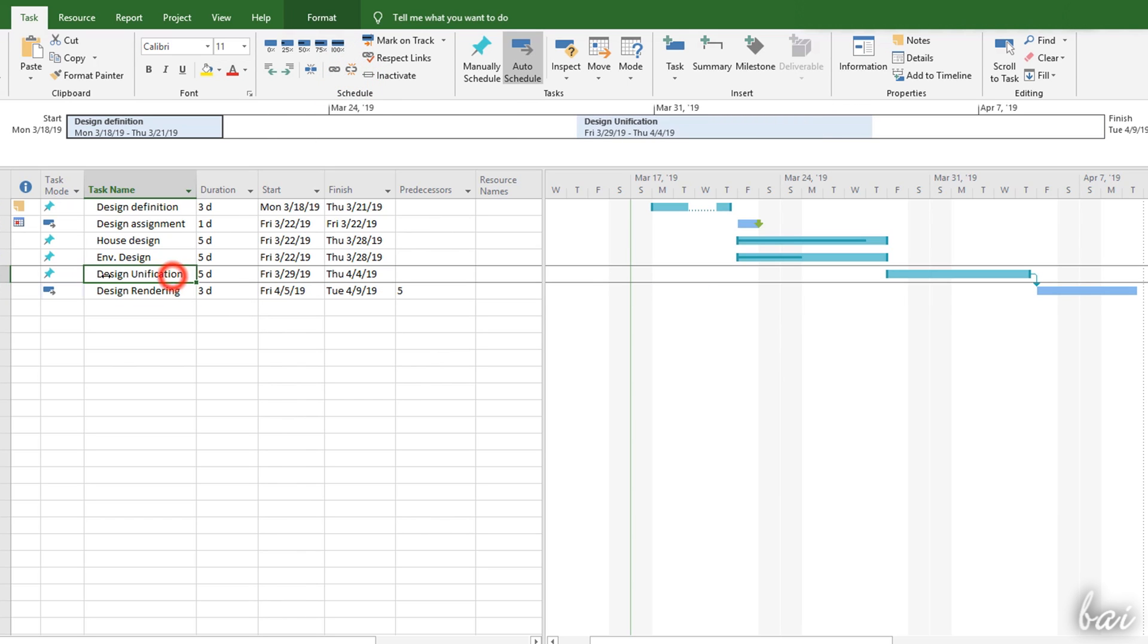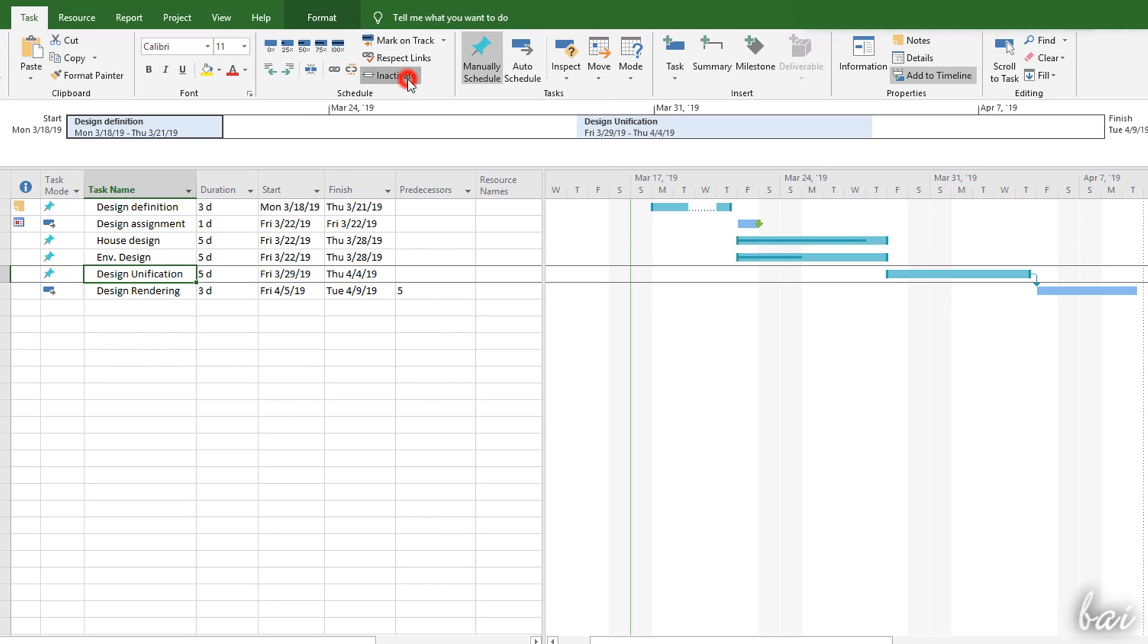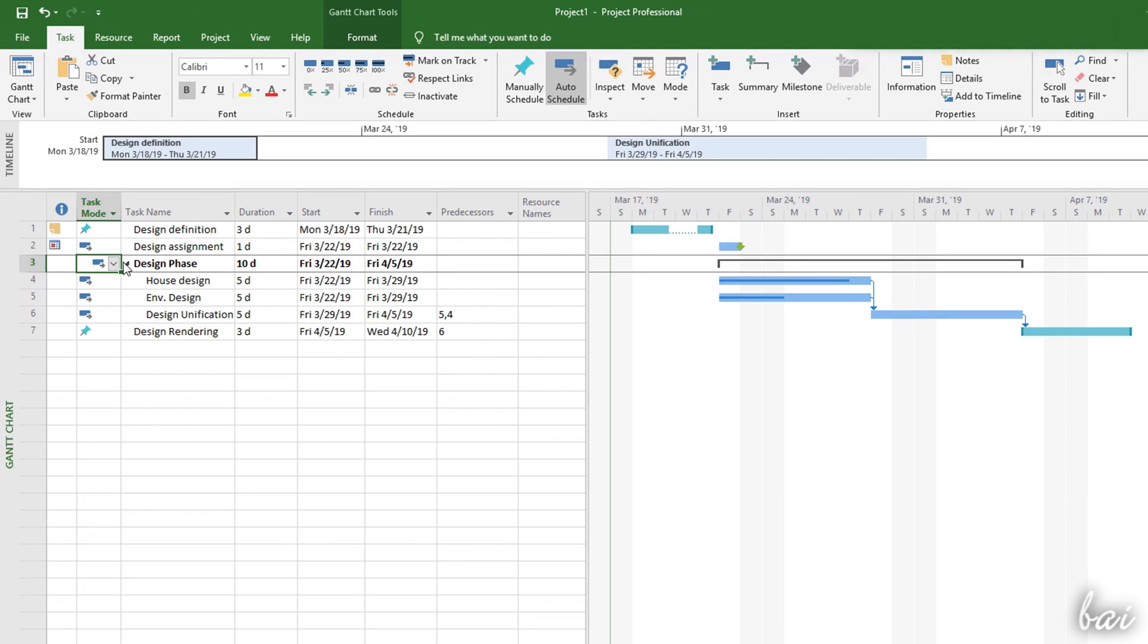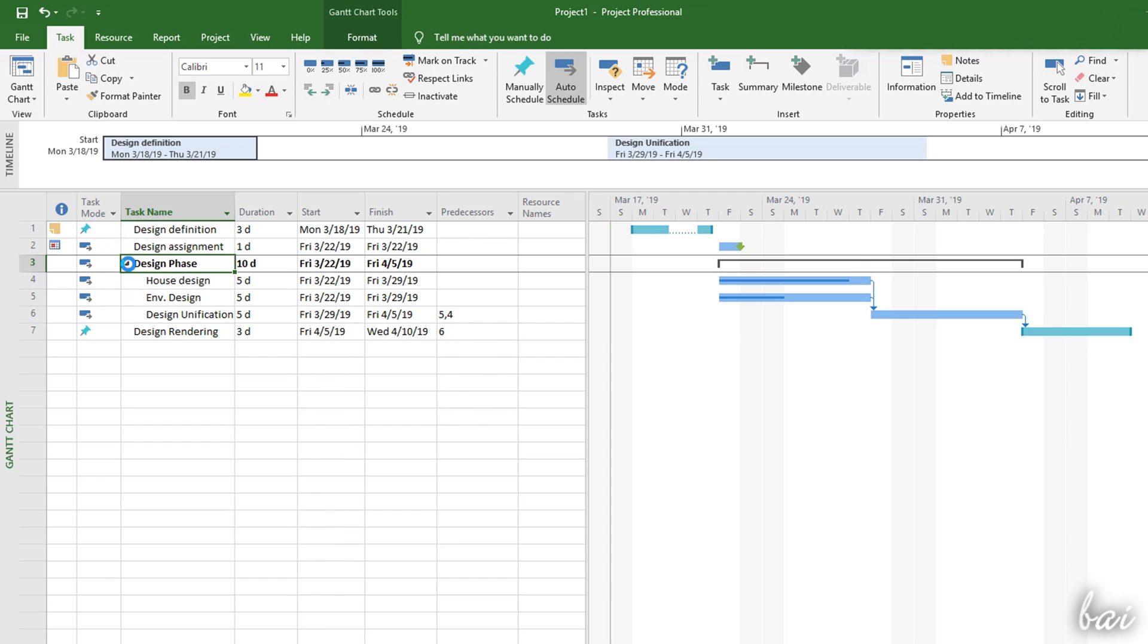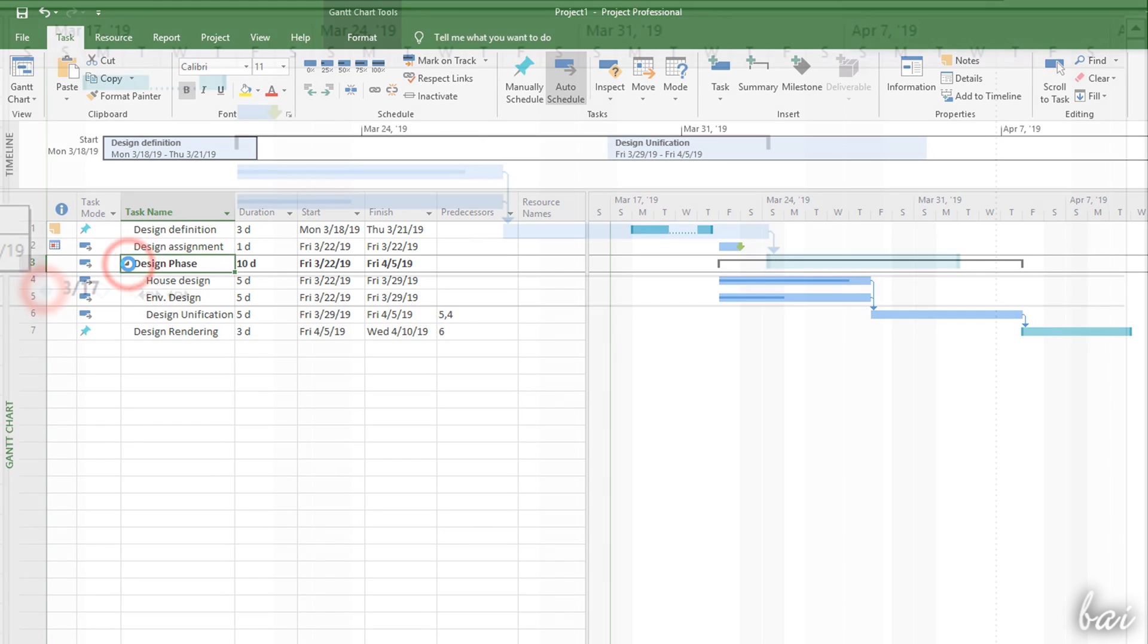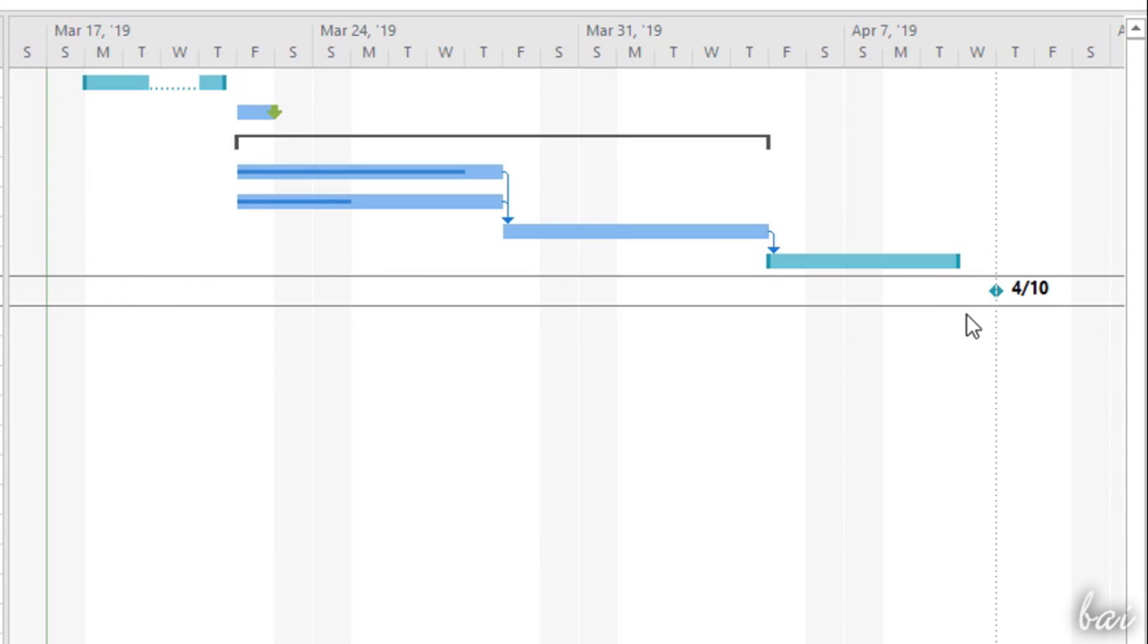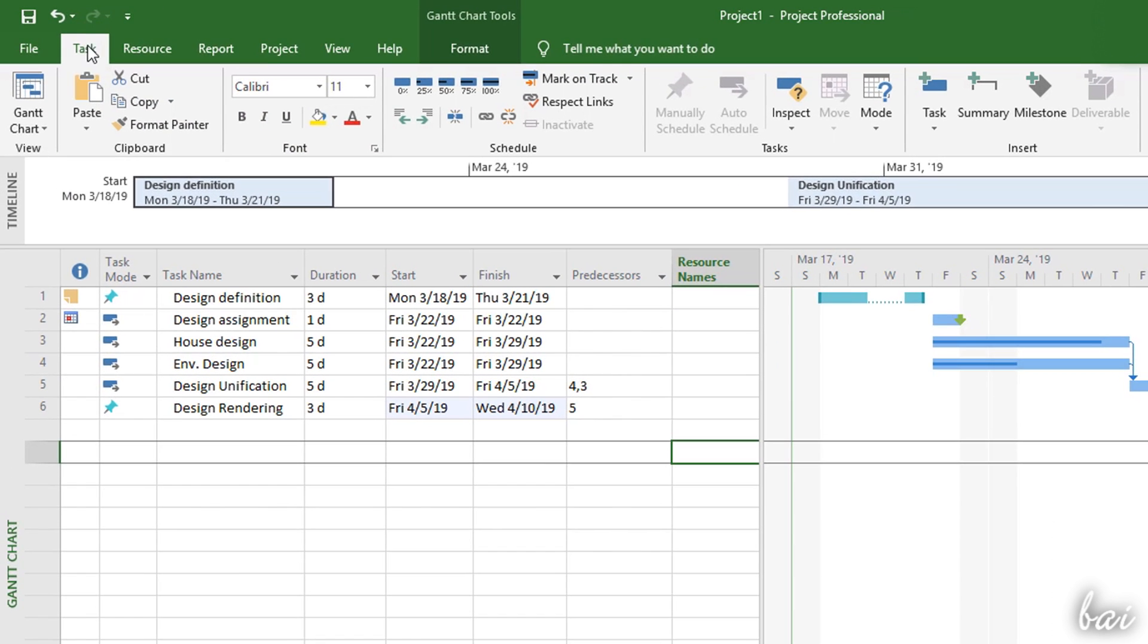If you have any task in progress but you do not want it to interfere with other tasks or links, select it and click on Inactivate. Besides the task, you also have the Summaries and the Milestones. You can add these from the Insert section under the Task tab.